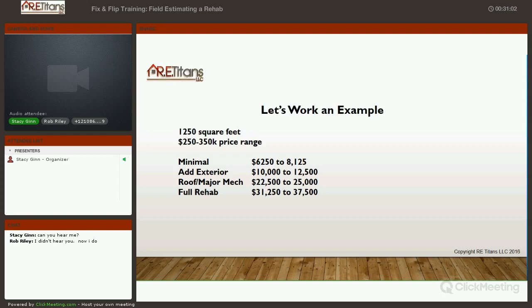And you'll see that in some subdivisions, they put in wood floors versus carpet, or engineered wood floors versus real wood floors, or vinyl plank, or you look at grades of carpet. So we have to take that into account, because that's where our ranges come in too, what quality, what level we're using. And that's what you'll see: hey, you can get this top comp, but you can't do the cheap rehab and get it.